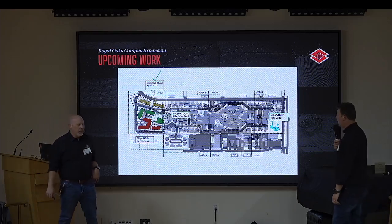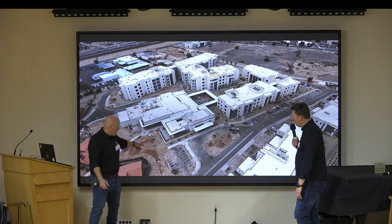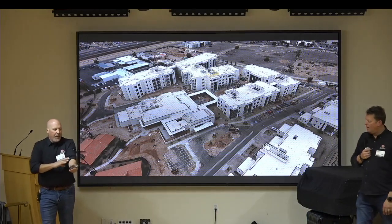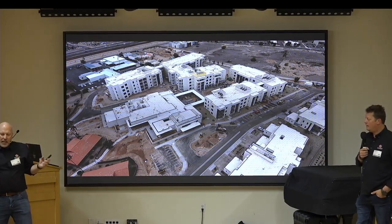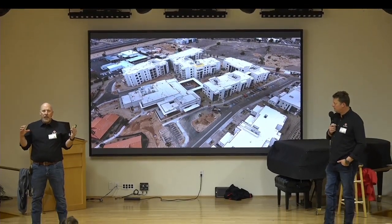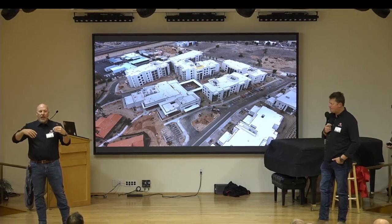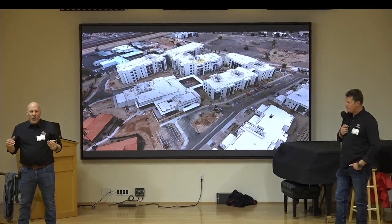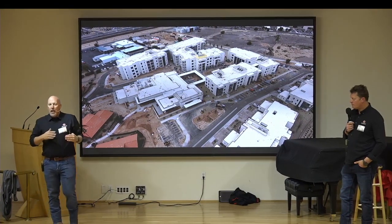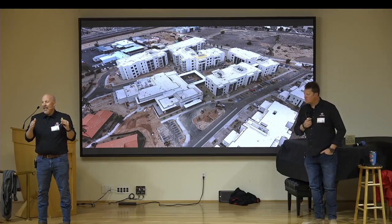Question was, what's happening with the drainage ditch by Building F, the fun building, which I promised we'd get back to. This guy right here. This guy is the bane of our existence. Essentially what happens is we have to be able to have a particular volume of water. If everything was backed up and we had a 100-year flood, it has to hold like 1,700 cubic feet of water. And right now, we are not quite getting that volume.